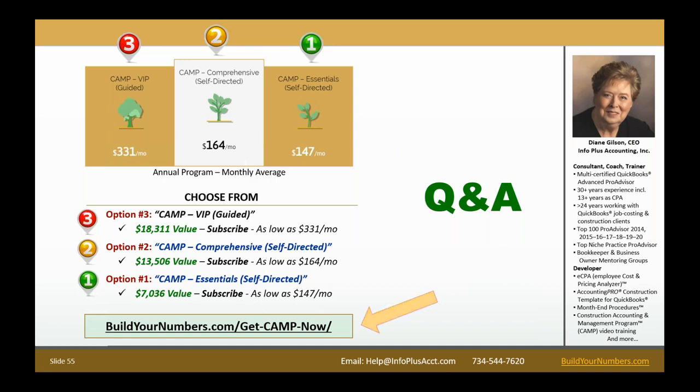And then when these jobs come to a conclusion, there should be really focused scrub exercises going through the jobs to understand where we went off track, understand where we won at the line item level. Think about the line item level as the invoices that come in. That's the area that you're going to budget for, and that really relates back to the cost codes that we're talking about.